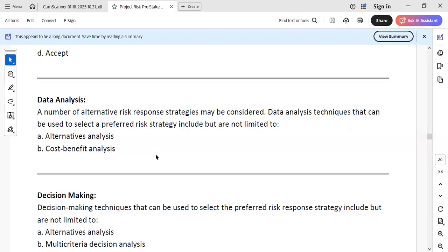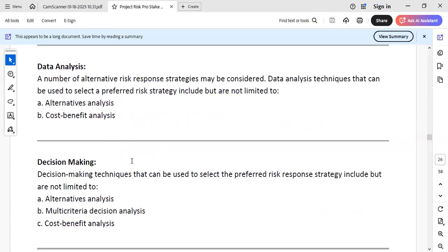Because if you're not careful, you now want to use $1 million to chase $500,000. So we want to know if we should implement it, if we should put a mitigative strategy, what we will get in return will not be less than what we would put on the ground.